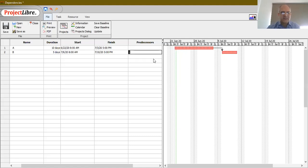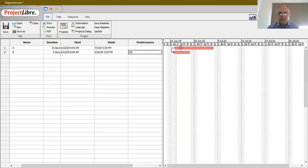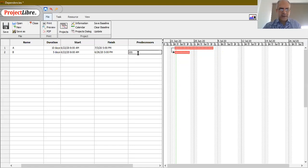Now, what if the dependency is different and we want both A and B to start together? We can introduce the Start-to-Start dependency by typing 1SS. You'll notice that A is still 10 days and B is still 5 days — we don't care when they conclude, only that they begin together. This is the Start-to-Start dependency introduced on the Gantt chart.